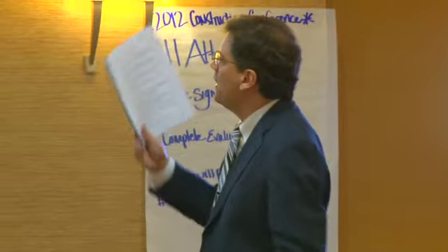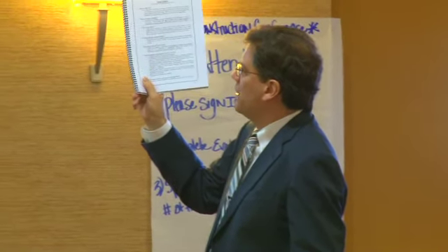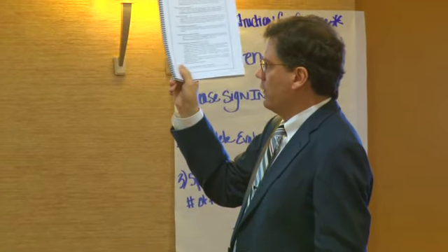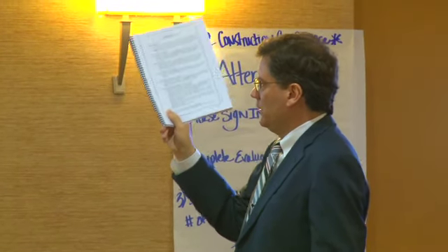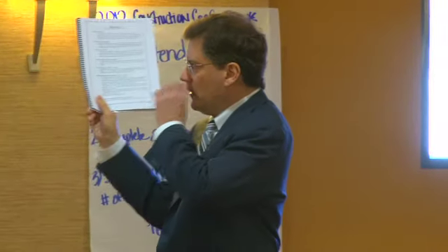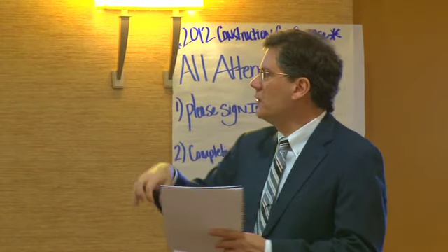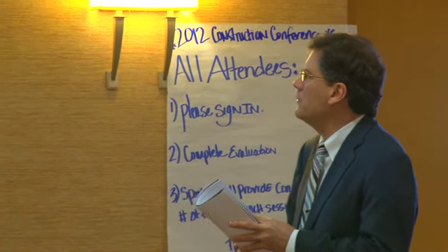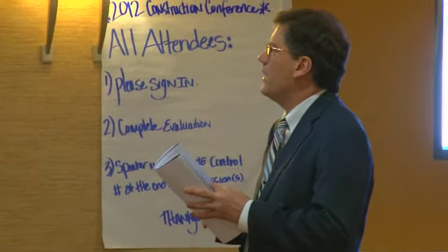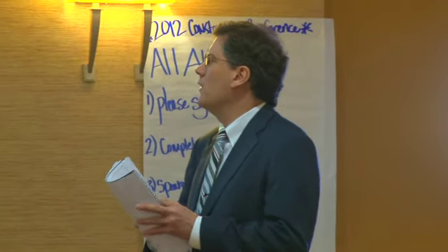Okay, let's look at that again. It's a device to freeze the flow of money from an owner to the contractor, or from the construction lender to the owner, until the stop notice claimant has been paid. All right, so there's two places there that it's potentially freezing the flow of money, from the lender to the owner, from the owner to the general contractor. Where are they available? Stop notice remedies are available only on a private project. They're not available against public projects or dwellings of owner occupants.